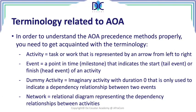In activity on arrow we also have what we call dummy activities. A dummy activity is an activity with duration zero — it's an imaginary activity. It's not real and is only used to indicate a dependency relationship between two events. There are some limitations in the activity on arrow technique, and it's only possible to introduce all the necessary dependencies when we are using dummy activities.